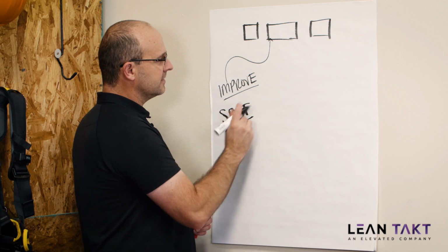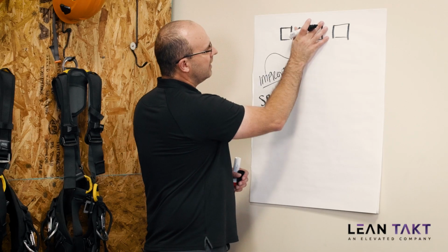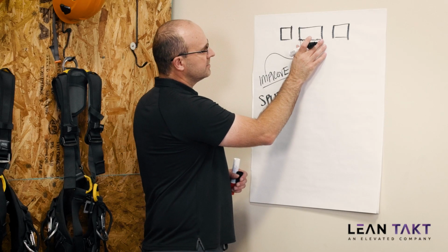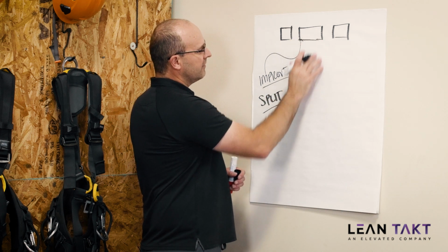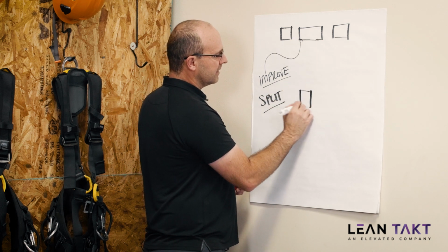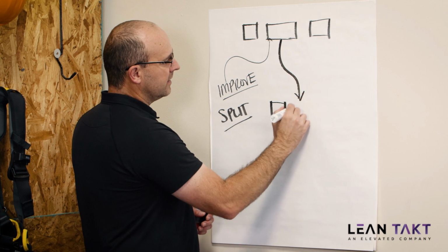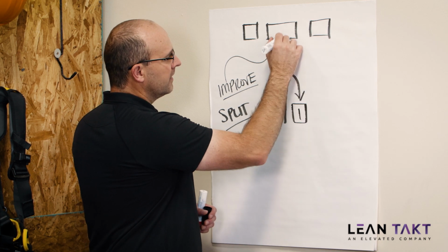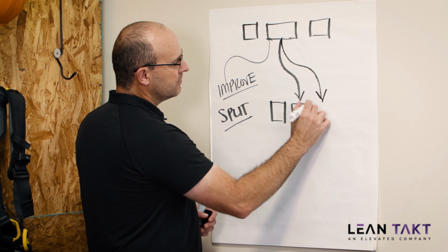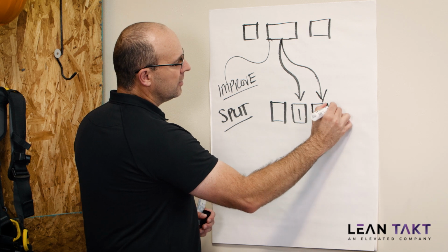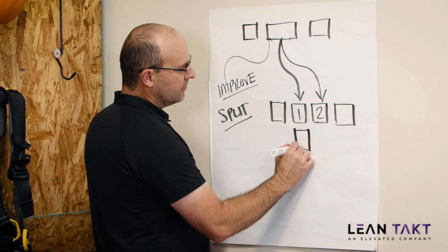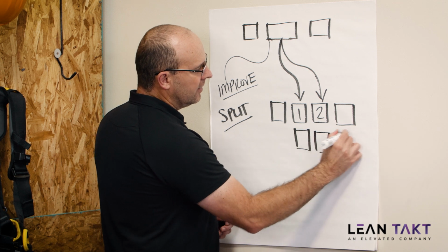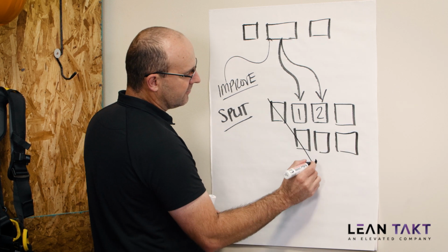And we've talked about this before. If you have, like, let's say a large 10-person crew, perhaps you can split that up into two 5-person crews. And this is what that would look like: this would become crew number 1 for that scope, this would become crew number 2, all trained with proper supervisors. And then, like you have seen before, you have that nice trade flow.